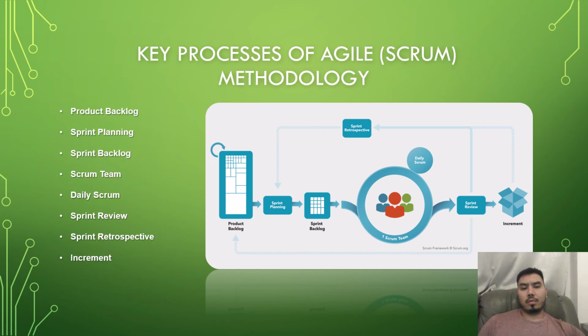So in Agile, all requirements are collected and ready from start to finish, and at any time more requirements can be added, edited, or deleted from the product backlog. The team will plan the sprint based on the size of the requirements, from 1 week up to 4 weeks, and then they will start working on the requirements. The team will also have a Scrum meeting on a daily basis. The Scrum meeting is roughly 10 to 15 minutes,